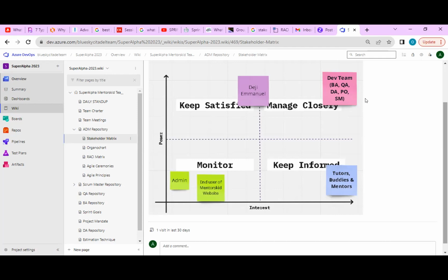Well, it's based on who has got the power or influence in the project. It's not necessarily the roles. Fantastic. So what we're looking at is their power and influence. Why? So that we can play the politics rightly. So you can know who has the power to stop your project. Who is it that you must make happy? Who do you need to write reports to?